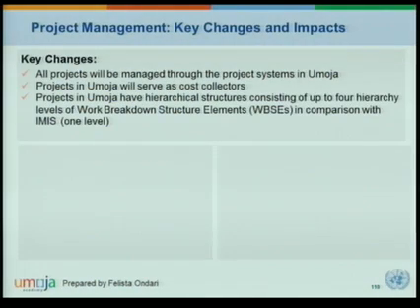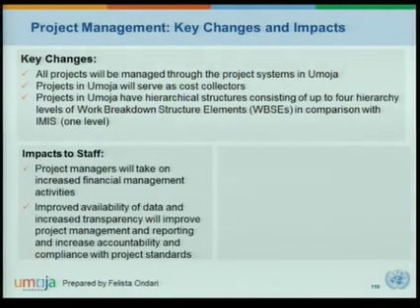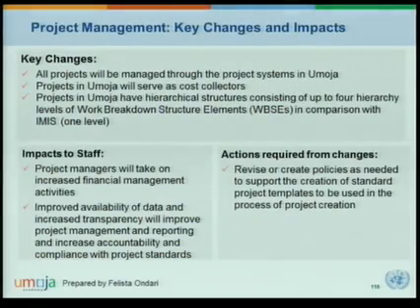The technical tool that we use in the Umoja system, just to introduce all the terminology, is called a work breakdown structure element, so WBSE. This is exactly the breakdown structure that you use for those projects in order to break it down into further levels. In addition to those work breakdown structure elements, there's something that is called an internal order. So if you have a project where you don't need to break it down further, you can use an internal order.